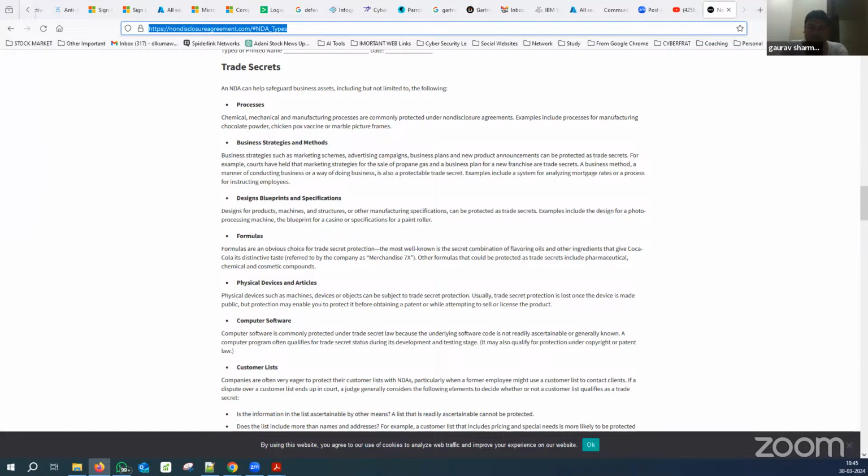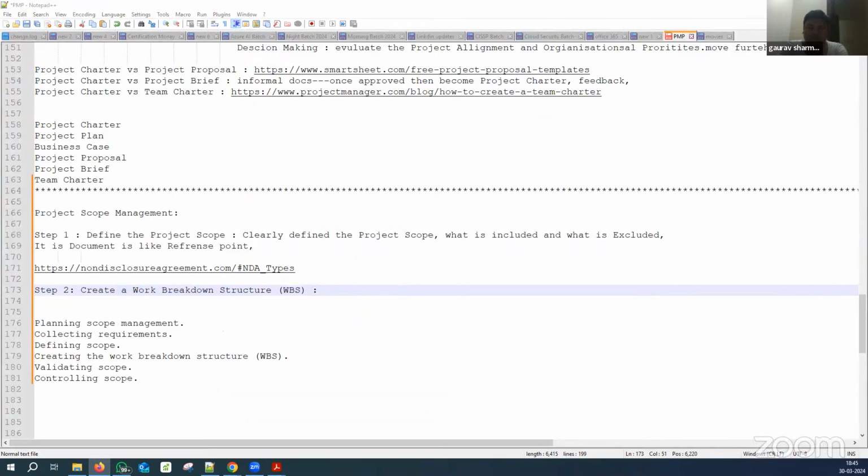Then there has to be a commercial approval on the quotation which they provide. So that is a work breakdown. We set a timeline for that particular task. Then comes the kickoff meeting, right? Then if we go one level down, comes the procurement part, then installation of the devices, configurations when it is approved. So this is how a work breakdown structure goes.